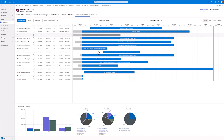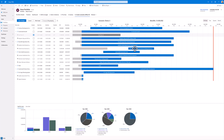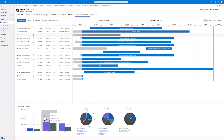We can also take a specific project and move it along the timeline. So if we're not going to work on it in 2022, I can drag it to the end of 2023, which is reflected in the expected costs within those time periods.